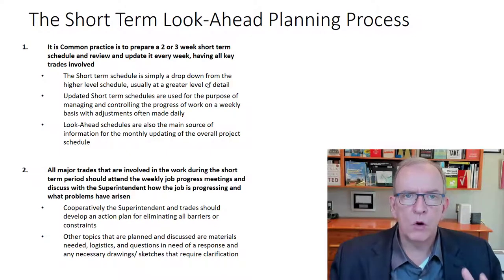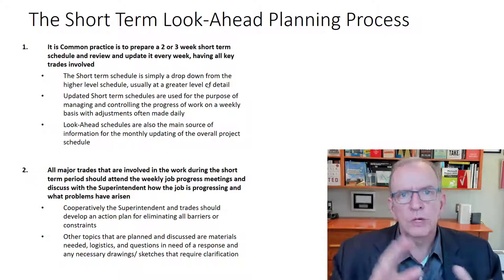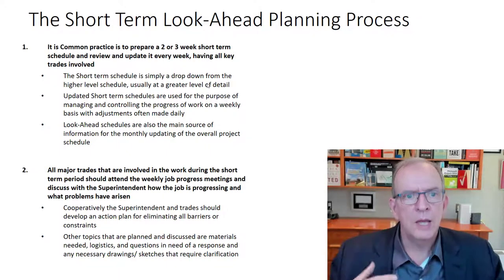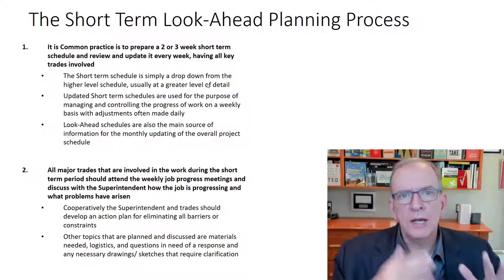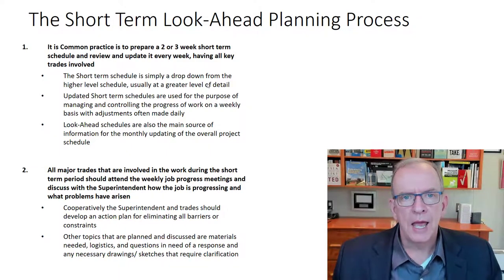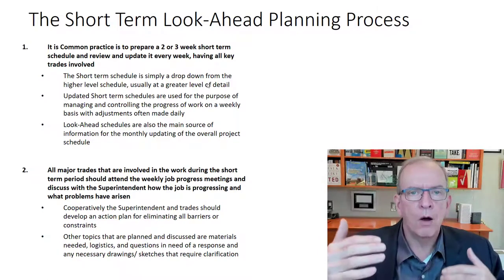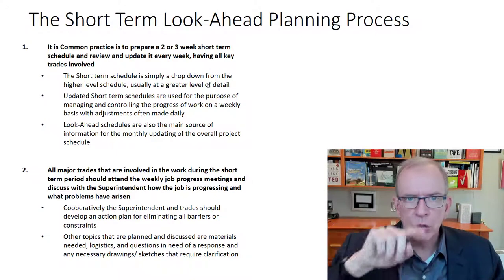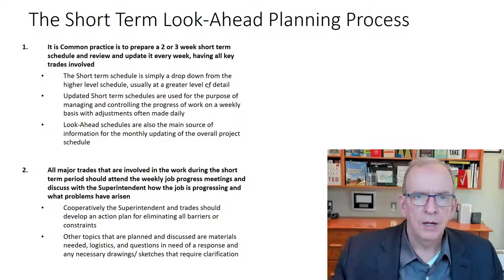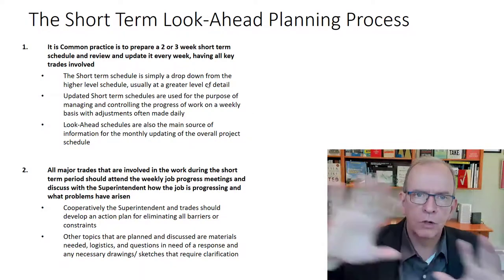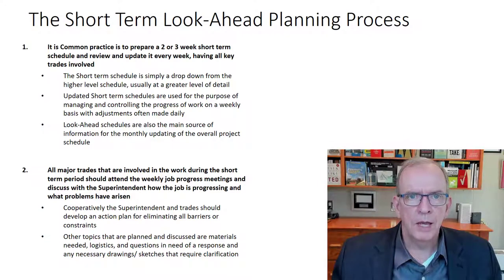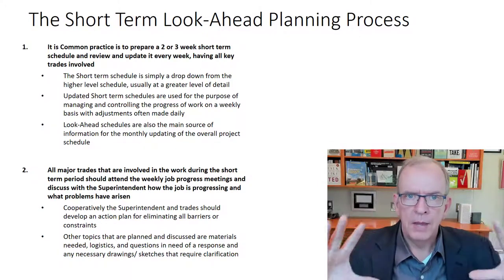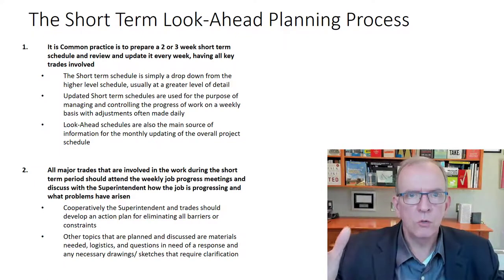We will traditionally have a weekly meeting where we work out the details of what's coming up in the next two weeks. That information is being pulled from our phase schedule or our updated master schedule. And we'll show how those need to play together, because if they're operating in separate worlds, it becomes a major problem.